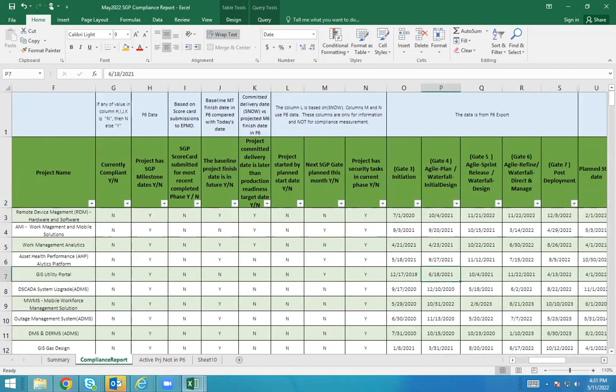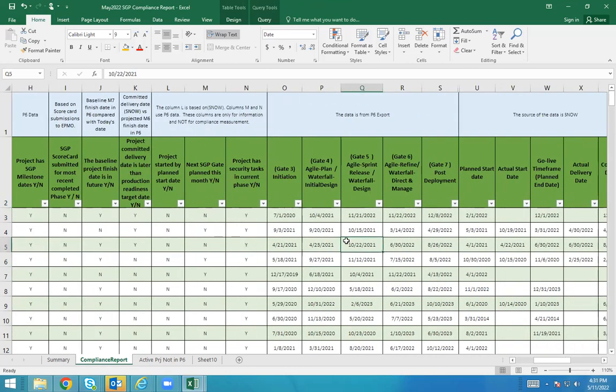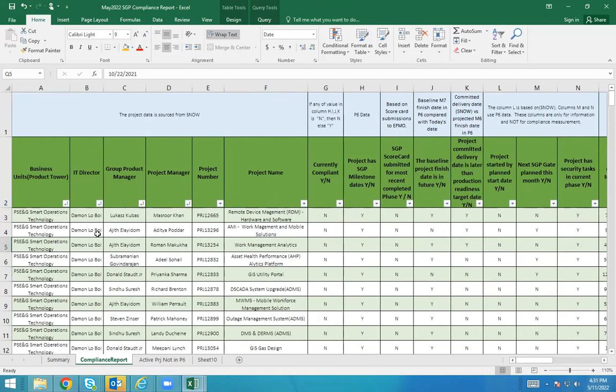So you need to join the two Excel tables on a common key, which is your PRJ ID. So we can do VLOOKUP, right? You can do either VLOOKUP, XLOOKUP, or whatever. Because there's a lot of data, correct? Right. In VLOOKUP, I'm not sure whether you can copy 4-5 columns at a stretch in one go. XLOOKUP gives that feature.